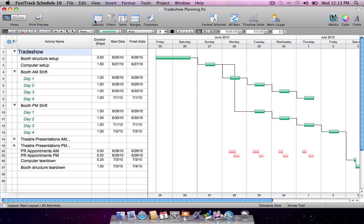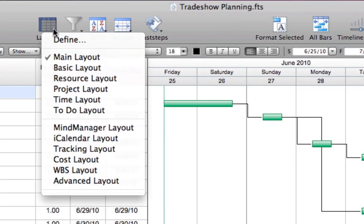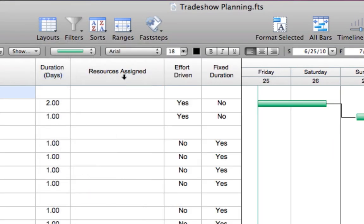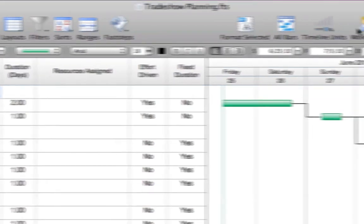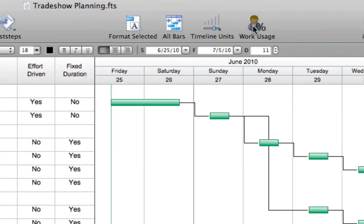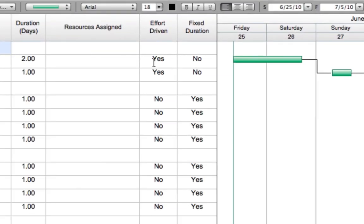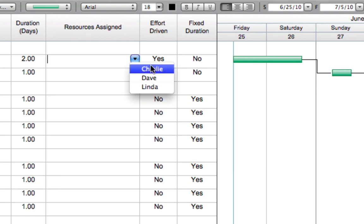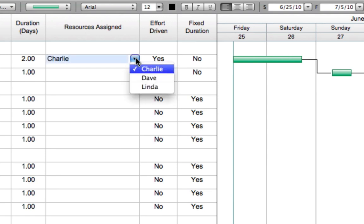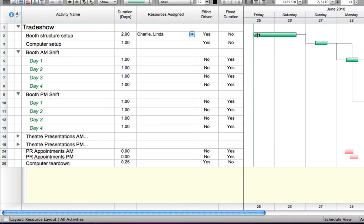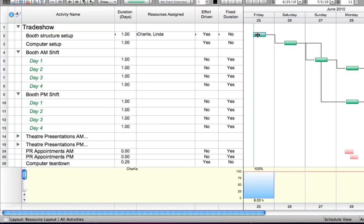FastTrack Schedule's combination of effort-driven and fixed duration scheduling options provide the utmost flexibility to schedule the way you want. Switch to the resource layout and activate the resource percent work usage graph. For tasks that can be completed faster by adding more resources, use effort-driven scheduling for simple schedule compression. As resources are added or subtracted, task durations are automatically adjusted while keeping the total work for a task constant.